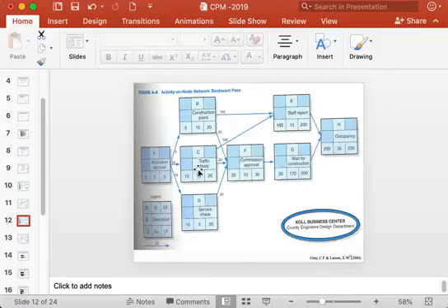For activity C, the following activities are again E and F, and from among them the smallest value is 20, not 185, so that is why 20 is put here as the latest finish time.